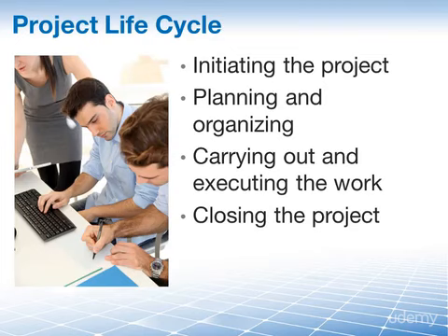Now, don't make the mistake of comparing this to the project management process groups that you'll also find in the PMBOK guide. This generic project lifecycle here, initiating, planning, carrying out, and closing, is what happens to the project as a whole, from the first minute we work on it to the last minute we work on it. The process groups, on the other hand, which are initiating, planning, executing, monitoring and controlling, and closing, are repeated again and again throughout each phase of your overall project. So, as you go through the project life cycle and you are in the initiating phase of your project, you will apply those 5 process groups, because initiating starts and ends at some point. Planning starts and ends at some point. So on the high level, sort of as an umbrella, we have the project life cycle, these 4 major stages, and then underneath it we apply the 5 process groups to each of these 4 stages.